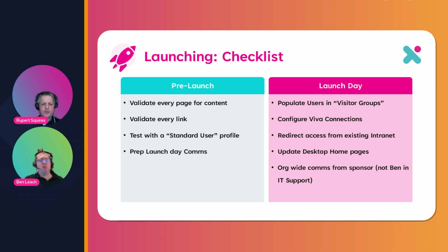But once you reach that point, and we're talking 1 or 2 weeks away from the actual launch date here, one of the key things we need to do is go through and validate every page on that intranet. Go through each page, make sure it's looking good. There are no big bits of white space other than what SharePoint already provides. Everything looks like it holds together. Click on every link and make sure there aren't any dead links that people forgot to fill in because they didn't have time. And I can't stress this enough.